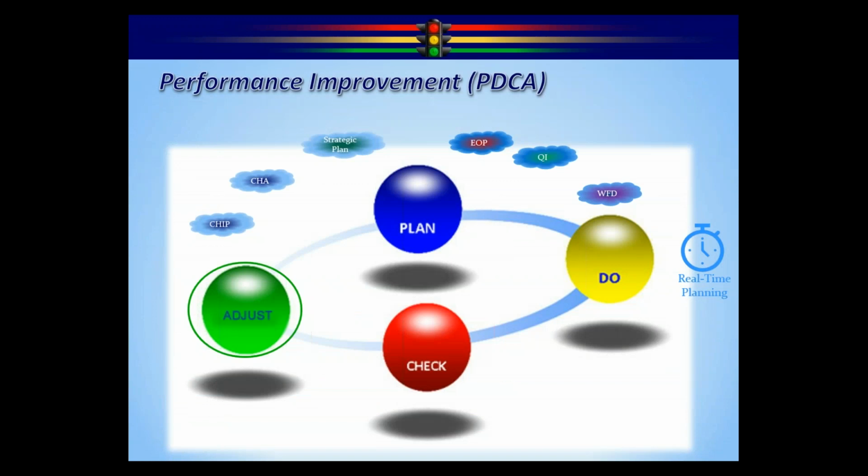One of the things we might do, given the situation, let's say going into COVID, not having additional resources to put into this program, would be maybe to adjust the plan. So we know we can get to 21%, maybe maintain that. So let's adjust our plan to 21% so we have a successful plan until this COVID thing is over with here. The other thing, if possible, can we adjust the resources? So one of the resources we had was the training. And we had the training going into the schools and doing it. Well, nobody's at the schools, can't do the training. What if we took and converted that training to a virtual based training that we could actually do over Zoom or whatever it happens to be and get to the kids and the faculty at home? So there's an option there.